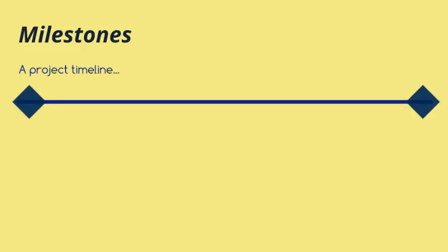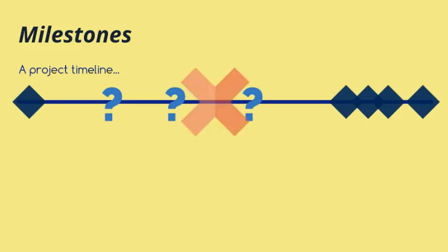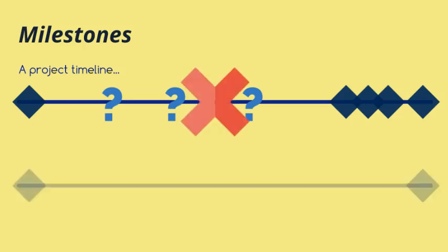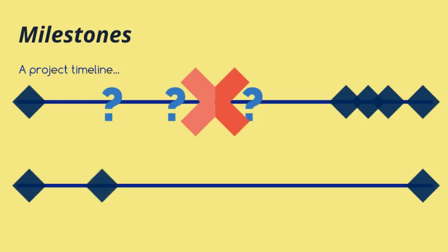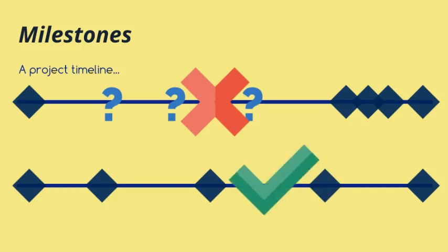You might be tempted to have a heap of milestones right at the end of a project because lots of significant events do happen at that point. But then how do you track progress during the previous parts of the project? Instead, it is good practice to spread the milestones out, wherever a natural event happens that represents a significant portion of work being completed.